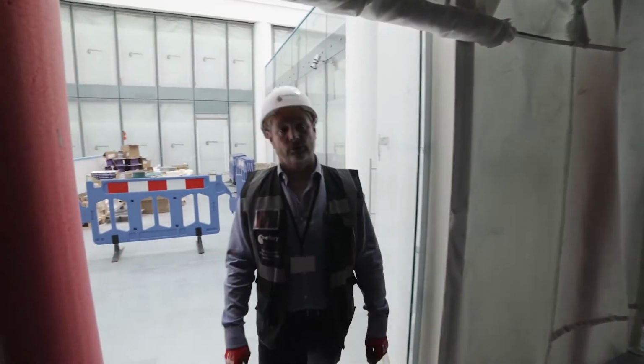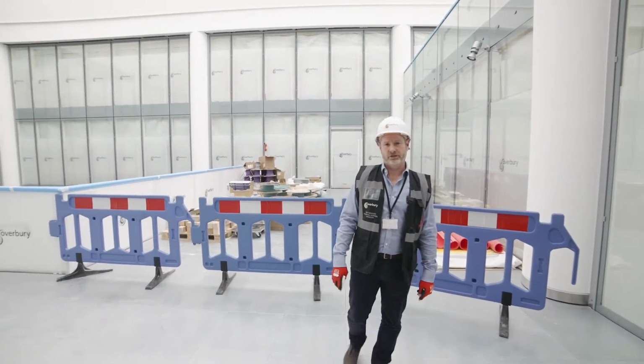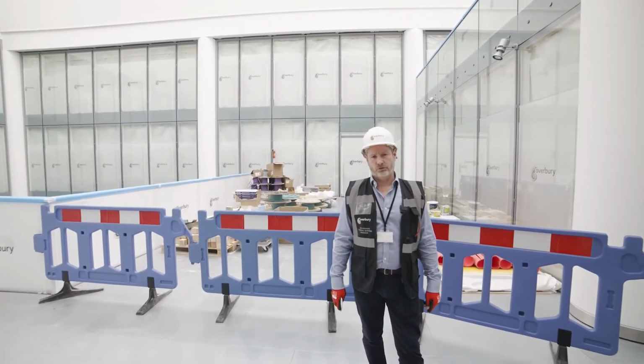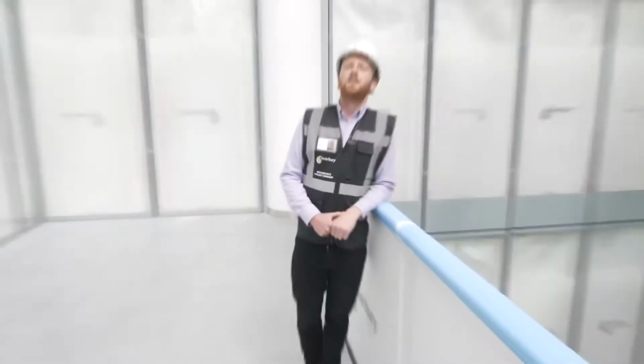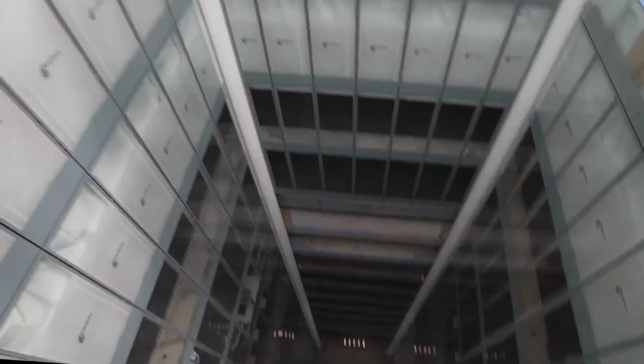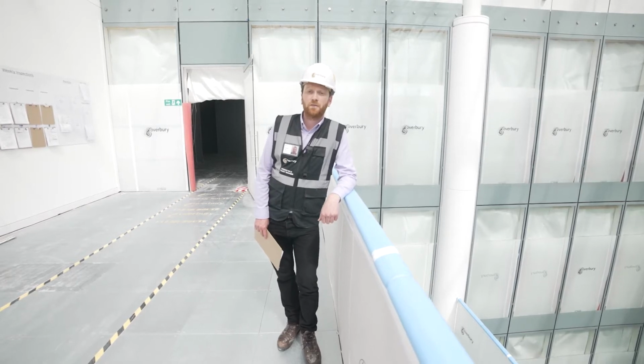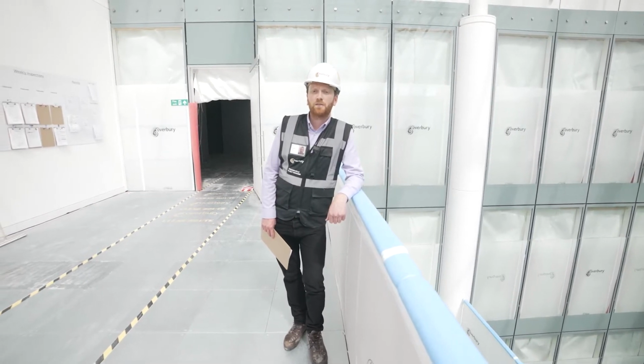They're even looking to implement a staircase linking the two floors of 16 and 17 together, which Richard will talk you through from here. The logistical challenge with the staircase is that the stringers are 10 metres long and have to come in finished. There's obviously no lift big enough to take them, which means they've got to come from down there to up here. It will be an Eyes Wide Shut, open for no shattered glass moment when that day comes around. That's nothing compared to what we had to do on the roof.